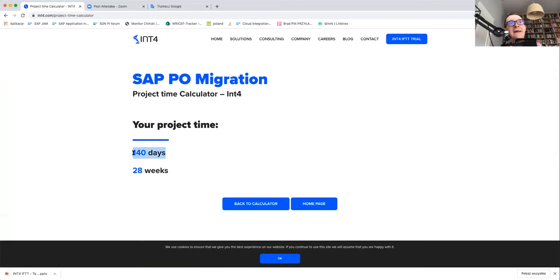So, okay, if I do it like this, it will take me around 140 days, meaning more or less 28 weeks if I'm working on the project alone, right? If I have more resources, then it will take half or maybe even less. But you can also use this sort of calculator. So if we go back to the